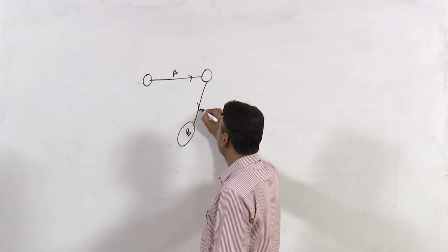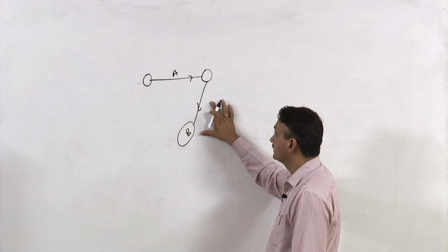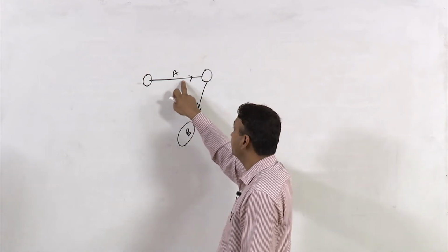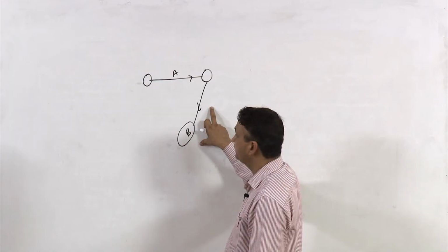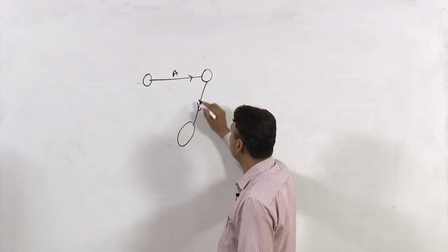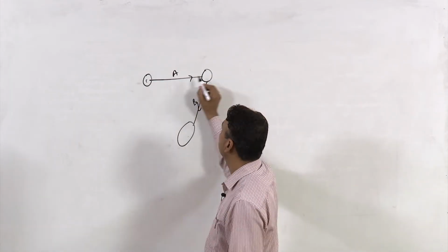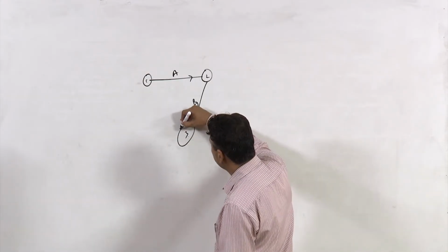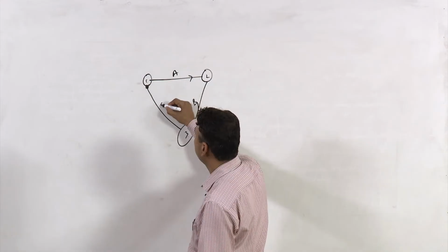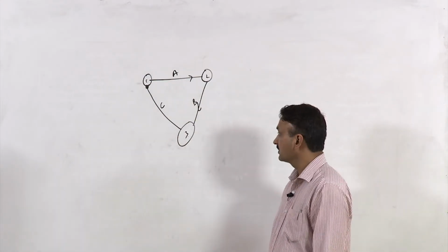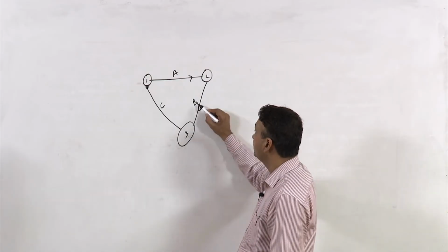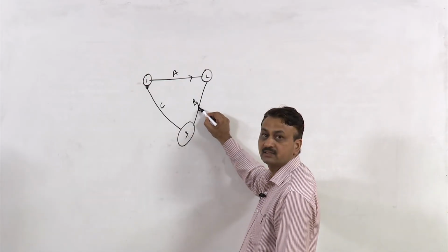So what we are saying is that activity B depends on activity A. Unless and until you complete activity A, you cannot start activity B. Let us say these are different nodes 1, 2, 3. Now you cannot have a situation like this. Activity C. You can start activity C once you complete activity B.